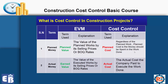When it comes to actual money, EVM uses the term earned value — the value of the executed work by its selling price or BOQ rates. This is what you earned, what you are going to get in your invoice or payment certificate. Where the actual cost is the actual money the company paid to execute the work done. So these are the main differences between cost control and EVM. As we go further in this course, you will find that cost control is not similar to EVM; there are different concepts and different methodologies to manage cost rather than the known EVM methodologies.